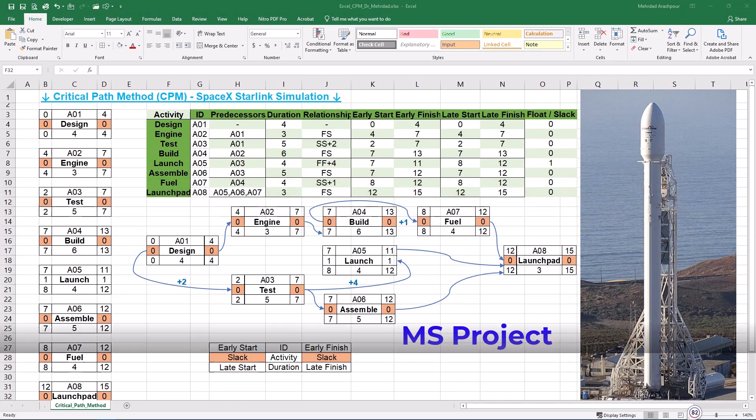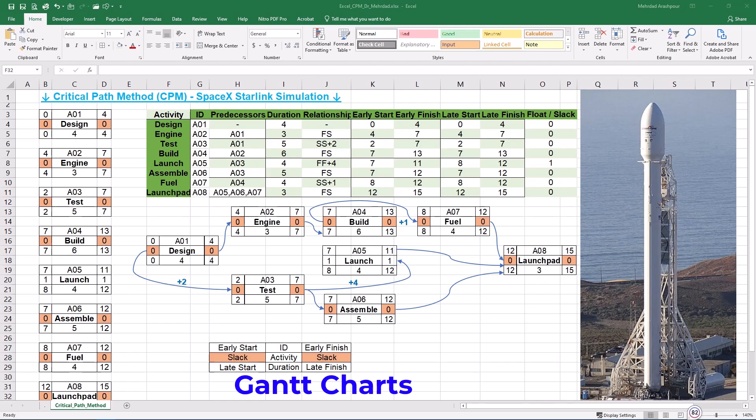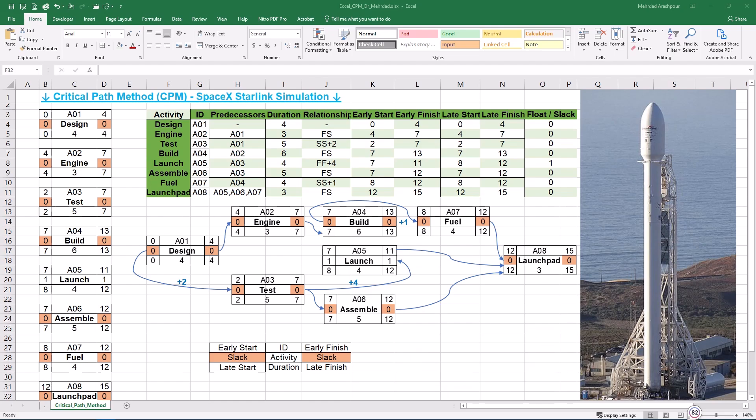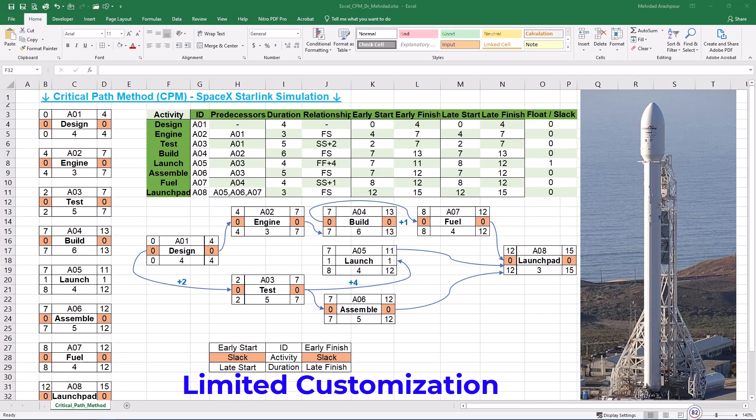The second option is using Microsoft Project and Primavera P6, which are industry-standard PM software capable of drawing CPMs. The first advantage is automated CPM analysis since Microsoft Project and Primavera P6 automatically calculate a critical path. Also, CPM networks are directly linked to Gantt charts, which makes tracking schedules easy. Both MSP and P6 have built-in support for FS, SS, FF, and SF relationships and lead or lag times. Finally, cost management capabilities in MSP and P6 help assign resources and track costs alongside CPM analysis. There are, however, some disadvantages related to MSP and P6. Both software has a learning curve and require project management expertise. Also, they require a paid license. Finally, they have limited customization and unlike Excel, you cannot fully customize the CPM diagrams look.